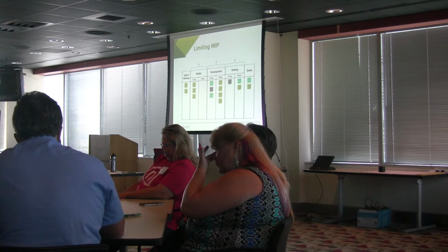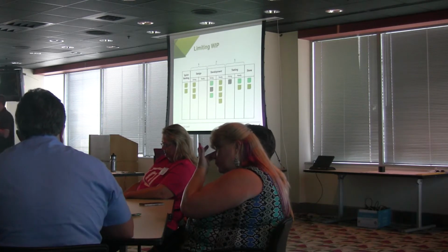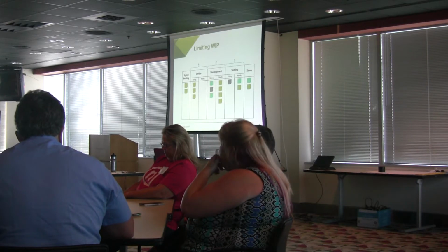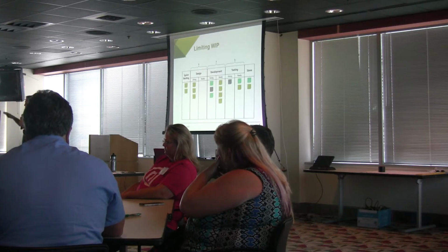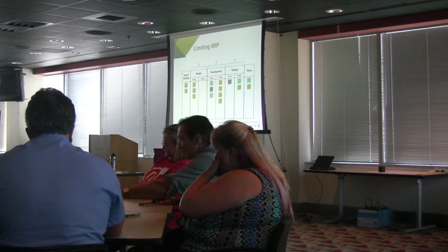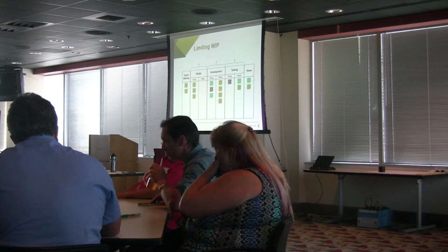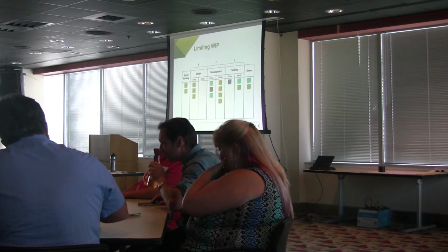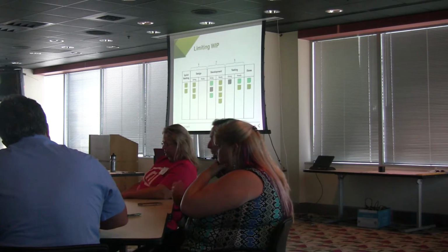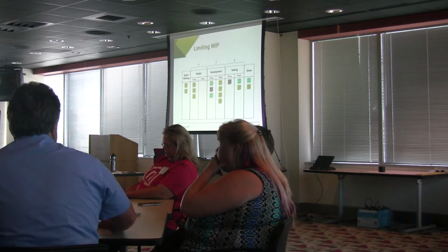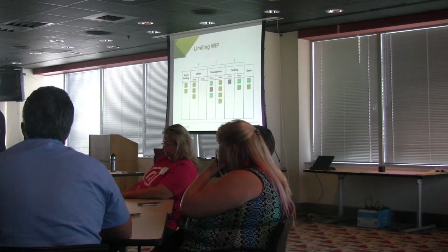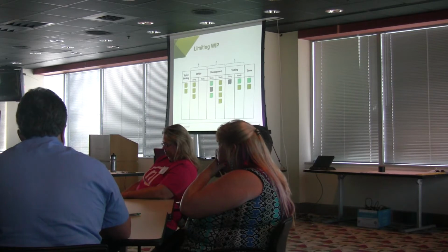It's not that, but when we consider how much time is available, if I'm available for 6 hours a day, I've got 2 hours of administrative stuff, maybe it's training, I start deducting training or different things like that. So I can't possibly do the same amount of work. At the beginning of your sprint is where you're figuring out how much availability everybody has.